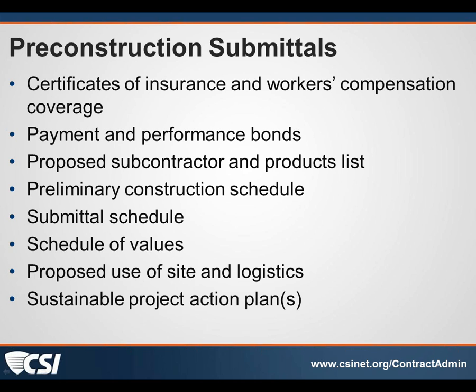None of these really are, or some of them could or could not be actually considered contract documents. A lot of times the construction schedule will become a part of the contract documents. Some of these sustainable action plans may become a part of the contract documents depending on how you have your front end set up. But those documents are information that, as Jim said, we use throughout the course of the project, be it the insurance certificate.